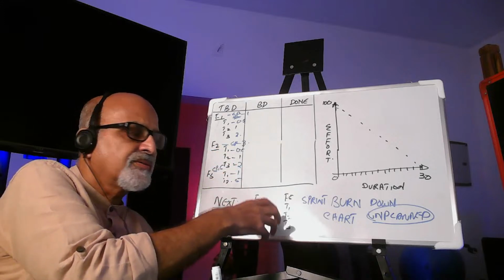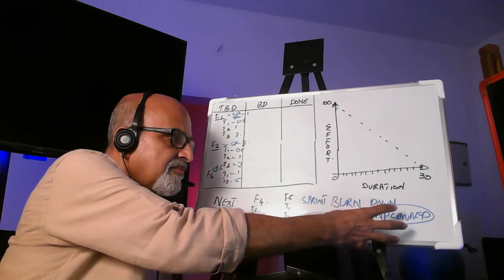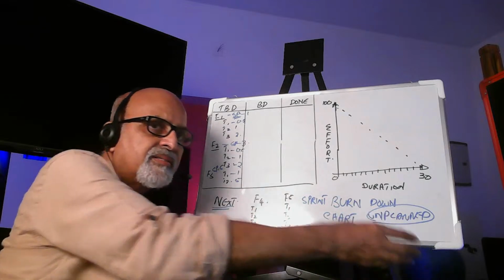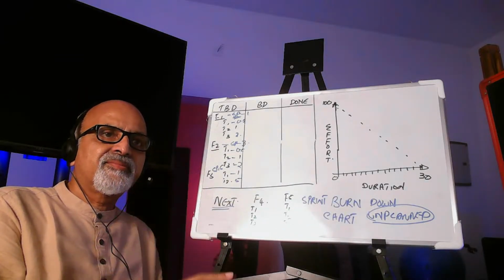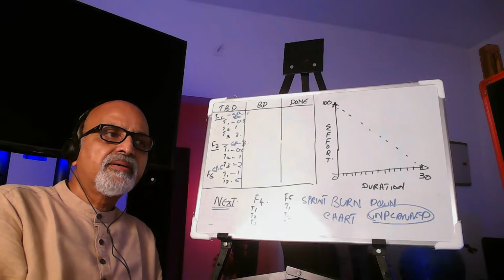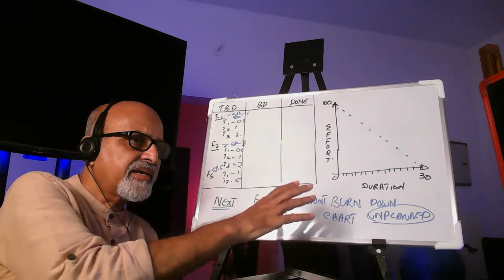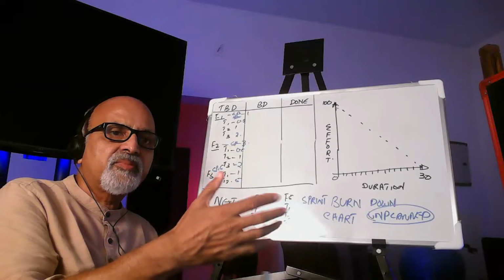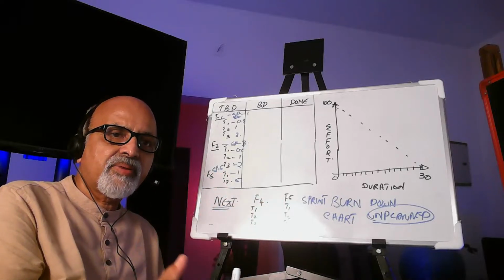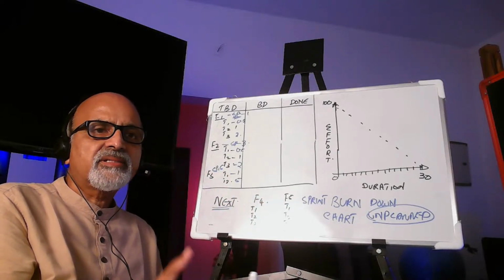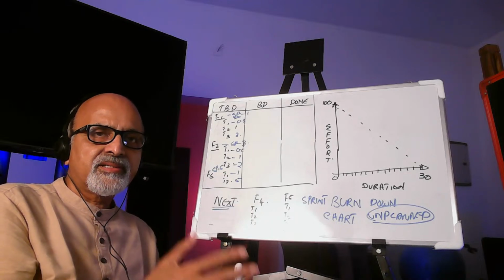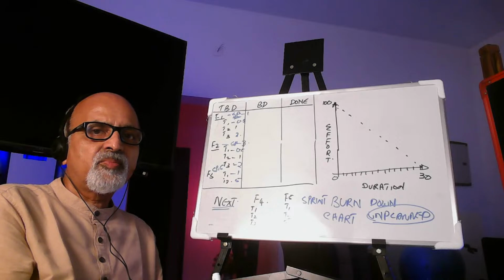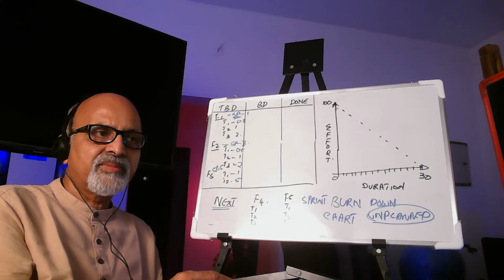Such things can be put under unplanned tasks, and maybe we can use a different color sticky note so that by looking at this tracking board, we know how many planned activities and how many unplanned activities there are, and we get all the statistics. So that is all about the outputs of the sprint planning meeting.